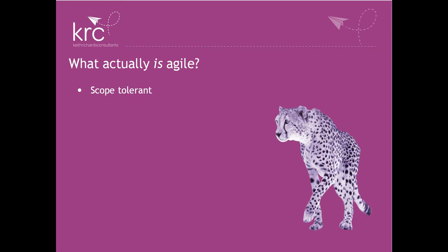Now that's a slightly complicated, fancy description, but what it means is you're feature focused. You're aiming at what you deliver. So if you have 100 features to deliver or 100 requirements or you've outlined the scope of 100 ideas that you're trying to achieve, it's playing with these ideas that is inherently an agile way of working. So if we're struggling to hit a deadline or there's a problem, we might drop some of the features out. So this idea of using the features or the requirements as your contingency and your variable is fundamental to the agile way of working.